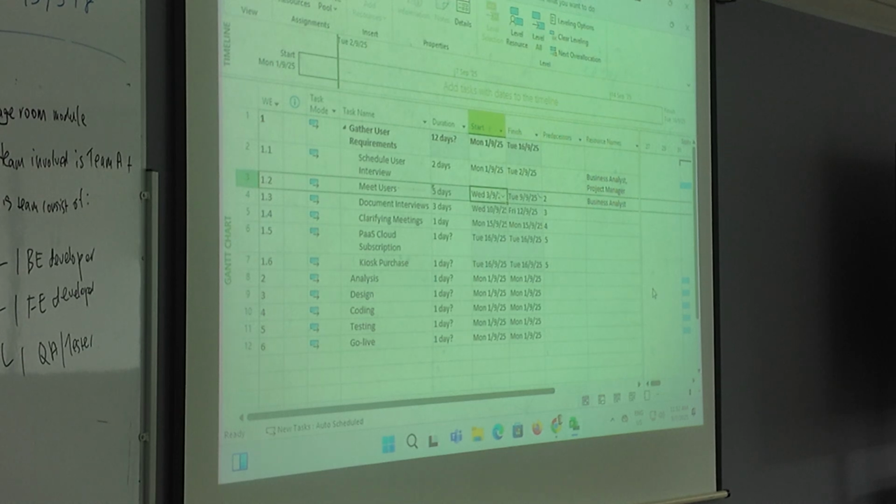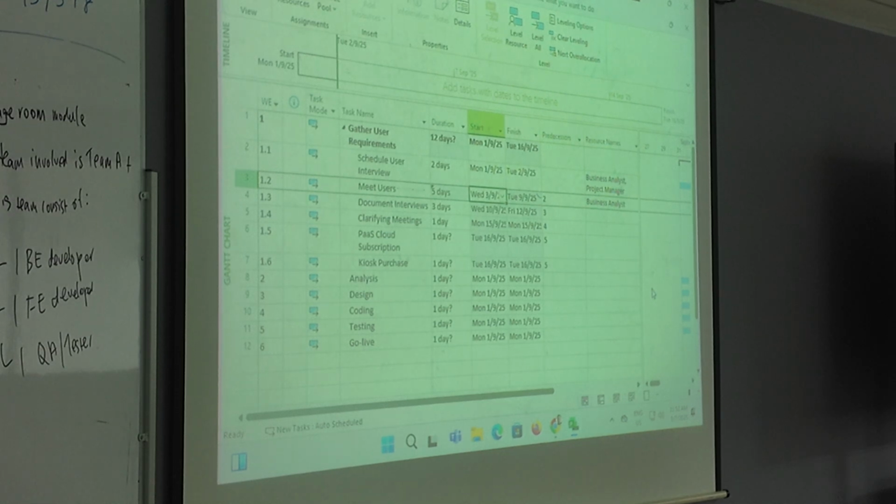So you can run reports to compare whether you are ahead of the project or behind the project. Right? So you always have a baseline to specify what was your original plan, and then you will have updates where you will update what actually happened. Instead of 5 days, I did it in 3 days. Instead of 2 days, I took 8 days instead because there was a delay.